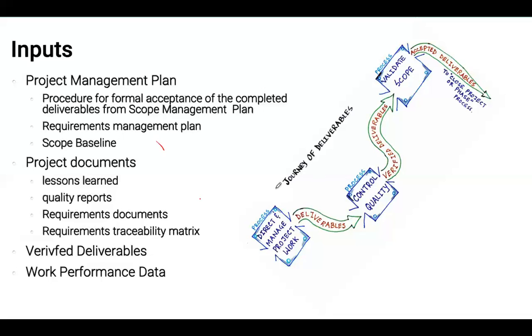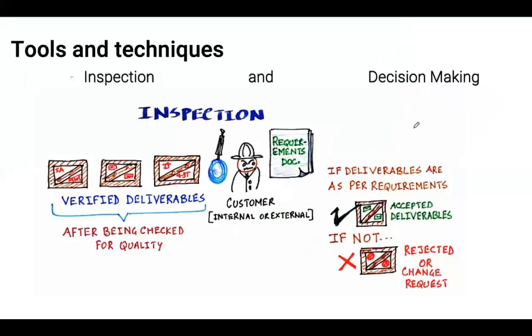So as you produce deliverables, those deliverables are going to undergo the quality control. Then the quality control releases them to us. So that's when we validate those deliverables against our technical specifications, so that we know that what we produce is not only good and works, but also works within the technical specifications that we are requiring by our project scope baseline. So now if we have a validated scope, very nice, we can release those deliverables to close project or phase of the process. We're going to inspect or make decisions.